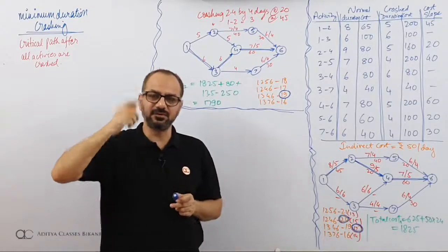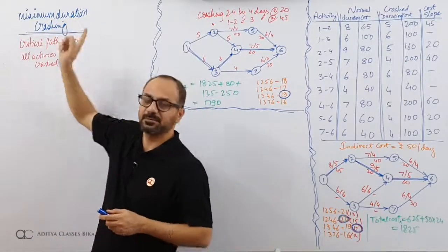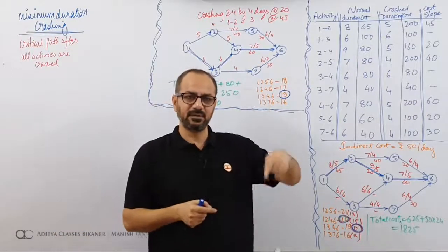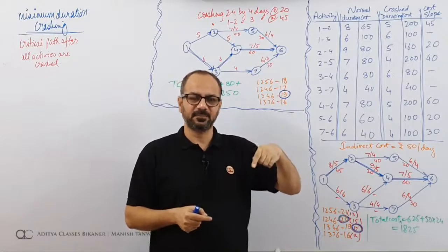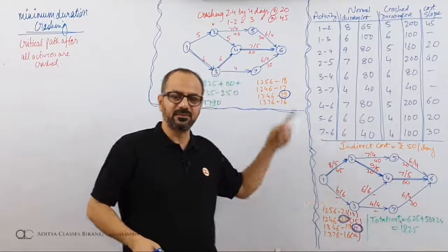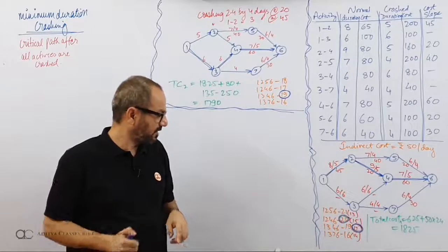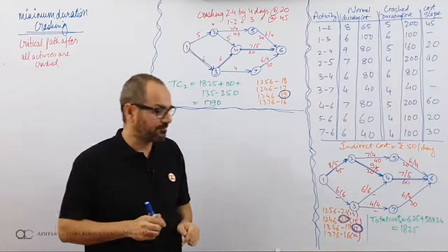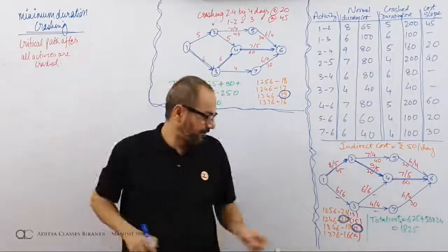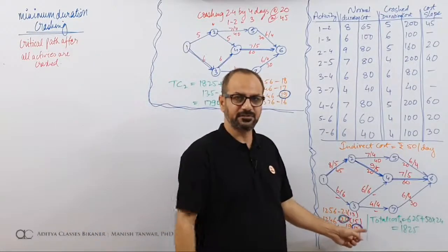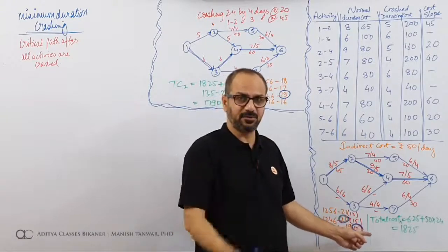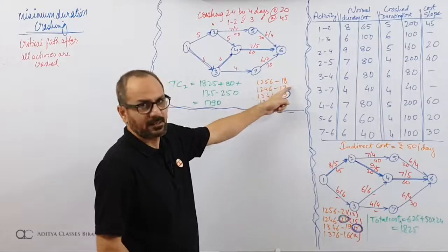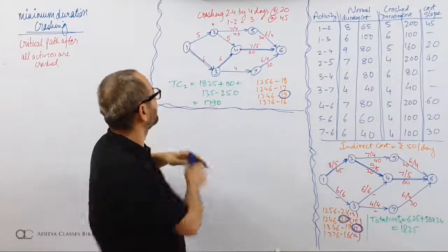In the previous question, when we were talking of minimum cost, not minimum duration, the benchmark was being revised. 21 came down to 19, 19 came down to 18. 24 came down to 21, 21 came down to 19. 19 was targeted for 16. So it changes. But this time, when we are talking of minimum duration, target point is fixed. Every critical needs to be brought down to 17. 24 was brought down to 17. Now this is the critical, bring it down to 17.